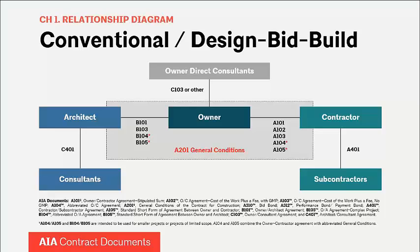Construction manager as constructor — also known as CMC, CM at risk, or CMR — uses the same A-201 general conditions for its construction phase. The A-201 is also the basis for general conditions used in shorter agreements for small projects, like the A-104 and A-105, as well as for other delivery methods including construction manager advisor and design-build. Even custom-written general conditions borrow significantly from A-201 concepts and language, often shifting responsibilities or risks between the parties.